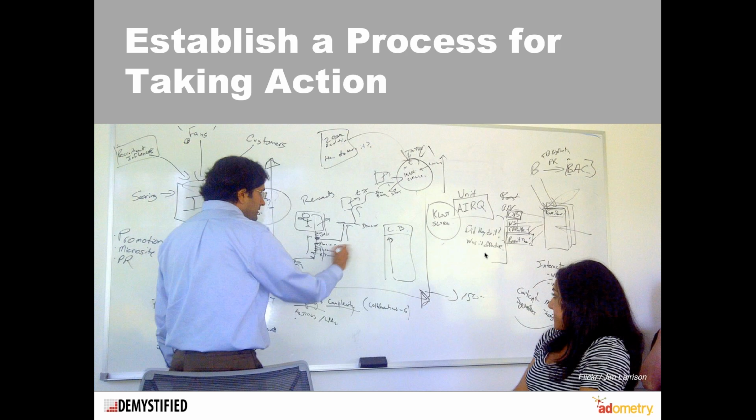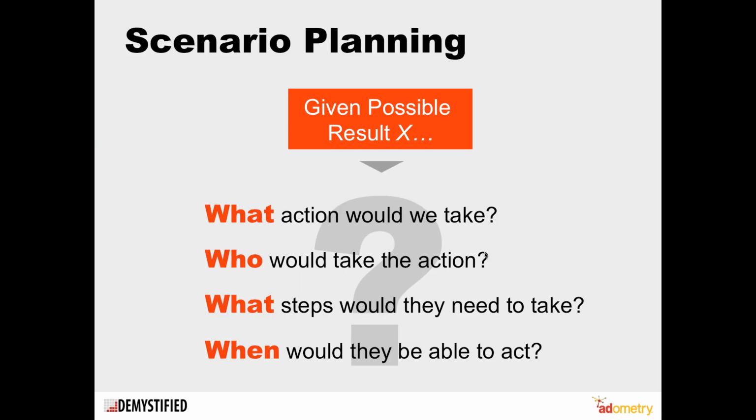So here, use scenario planning, which is a classic planning and process development approach. When it comes to attribution management, work with your platform provider and say, let's pretend, what are some possible or likely results? Dummy data, but in a format that matches how I ultimately expect to deliver results. Let me get the channel owners in a room and say, I need your input. I need your help. I want to make sure that what we're setting up is something that ultimately will lead to action and business value.